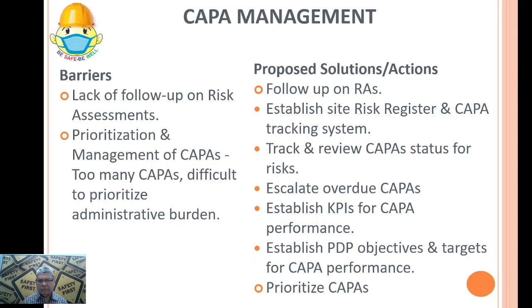And those reasons must be convincing reasons to the higher authorities. So maybe there will be a sanction to extend the date of the CAPA, that okay, you are not able to complete in this timeline, you are going to get another 8 days or 15 days to complete it.